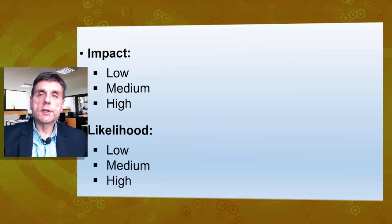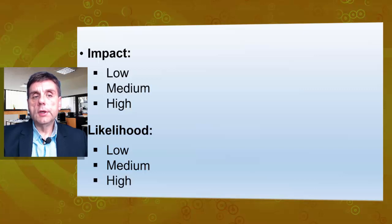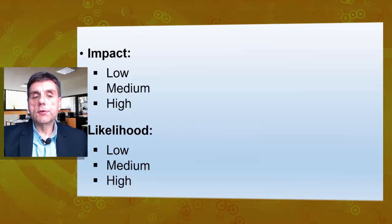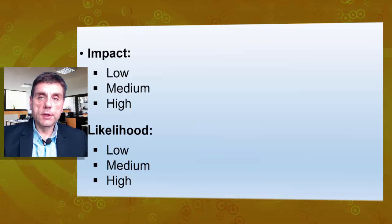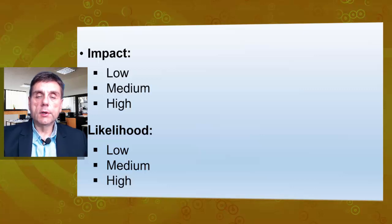Or we can expand this scale and say, for impact: very low is 1, low is 2, medium is 3, high is 4, and very high is 5. The same applies to likelihood: very low is 1, low is 2, medium is 3, high is 4, and very high is 5. With this expanded scale, we could have 25 possible combinations, compared to only 9 possible combinations with the simpler 3-point scale.